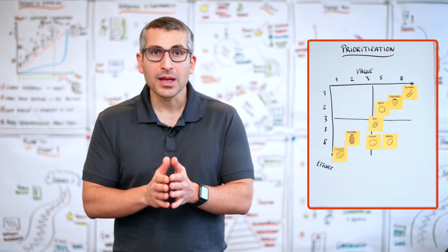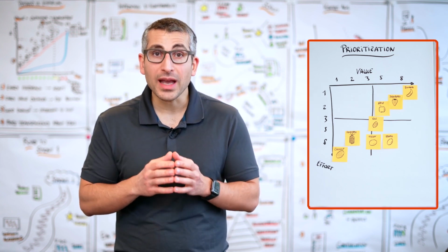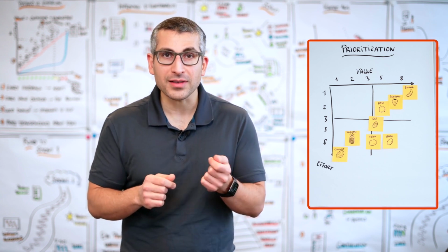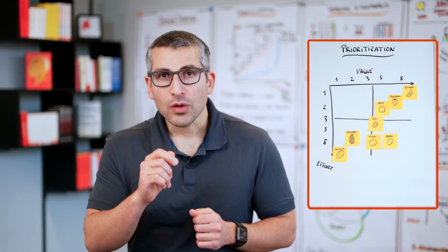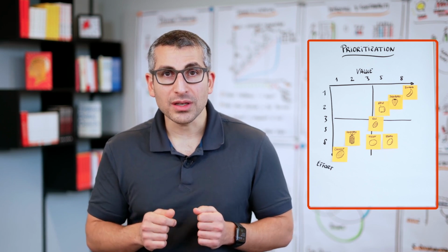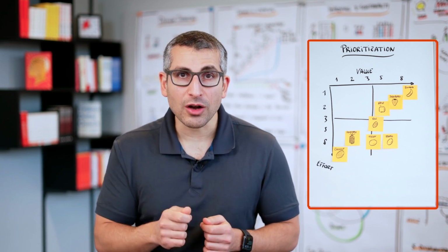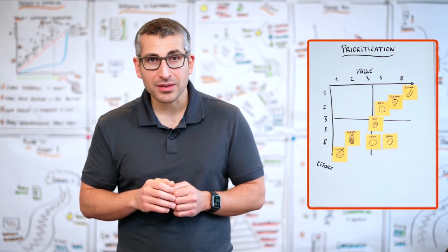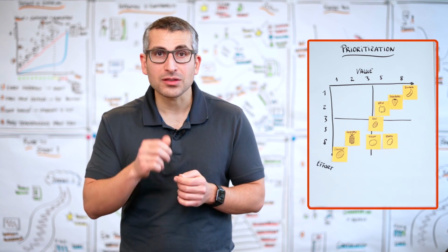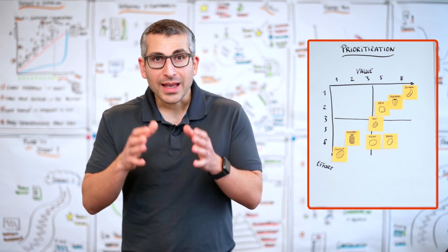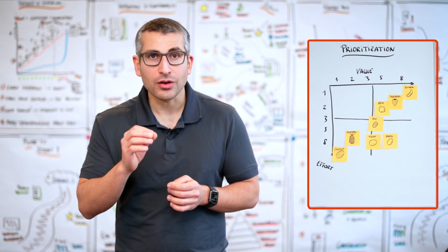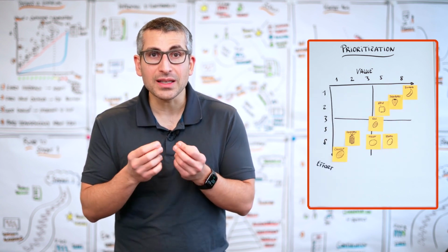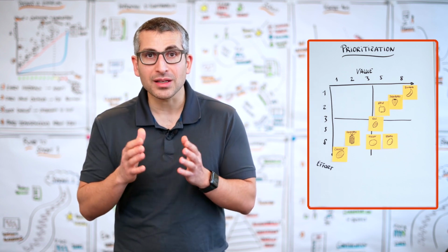Now, this type of prioritization considers 2 dimensions. The first one being the value, the second one being the effort. You can also look at it as some kind of return on invest, value for effort. When a product owner does prioritization, they in many cases need to account for other dimensions as well. One dimension could be technical dependencies that the developers highlight towards the product owner. In our current scenario, there are no technical dependencies. Each of these items can be delivered individually without impacting the others.